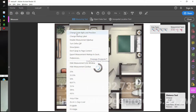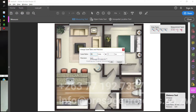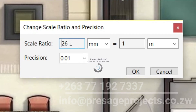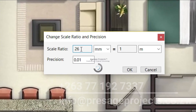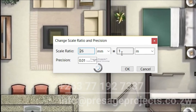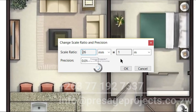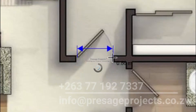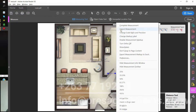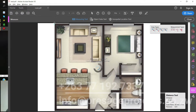The first thing you need to do is calibrate your drawing. I've already worked it out — I need 26 millimeters on paper to represent one meter on the ground in real life. To verify, a standard internal door opening should give me something around 0.86 to 0.85 meters, which is less than a meter. That allows me to start measuring from here.